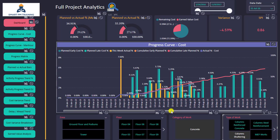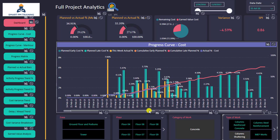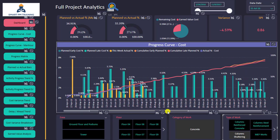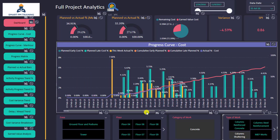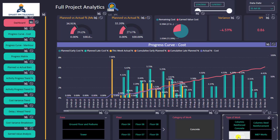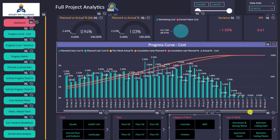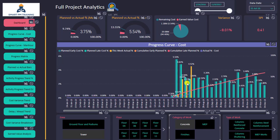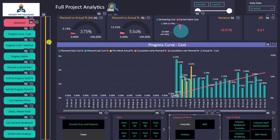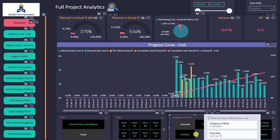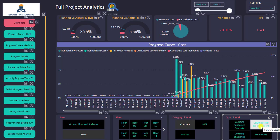I can do whatever I want — for example, column shuttering — and I can now have the progress curve for column shuttering only, with planned versus actual trends. This is very powerful and depends on the level of detail you want to analyze. The S-curve is generated for me with planned versus actual, and progress indicators are interactive with my selection.